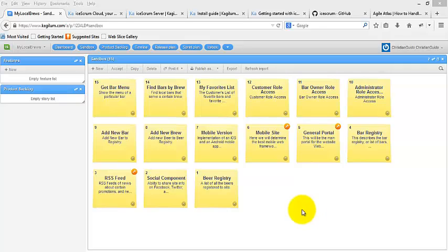And the sandbox is for anybody in the project to be able to log in and add potential stories, but only what the product owner, or anybody else authorized to make that decision, wants to proceed goes into the backlog or becomes a feature as well.